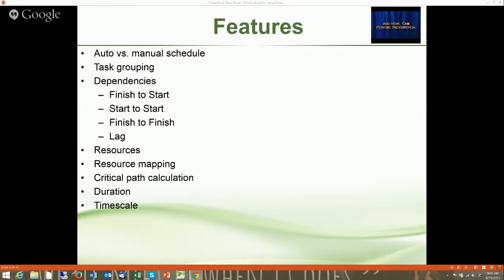And then the time scale that displays, many of these packages allow you to specify what time scale you want to display. So if the default is it's going to display months and days, maybe you don't want to display days because this is a long-term project, you want months and weeks. Or maybe if you're working on a project over the weekend, you want hours, which is something that we're going to do. Now, let me get this up so we do the right thing.